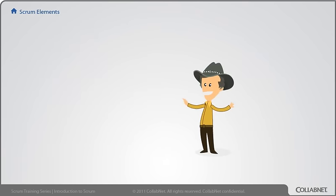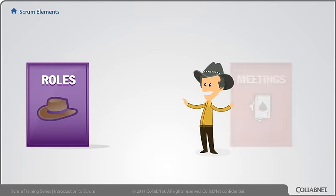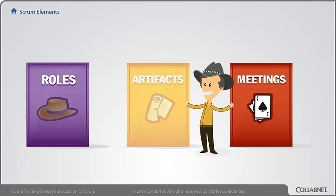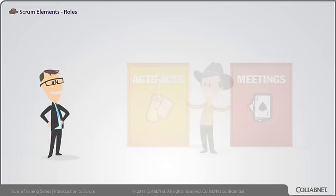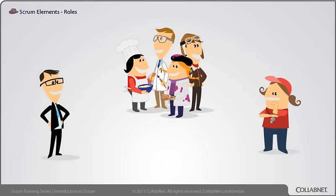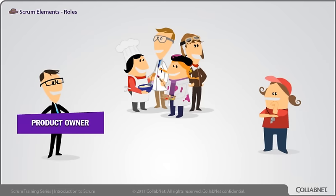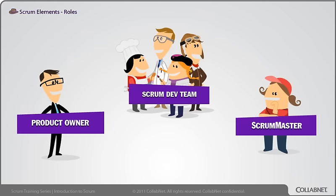Scrum provides a structure of roles, meetings, rules, and artifacts. Let's do a quick overview of them now. There are only three roles defined by Scrum: Product Owner, Scrum Development Team, and Scrum Master.